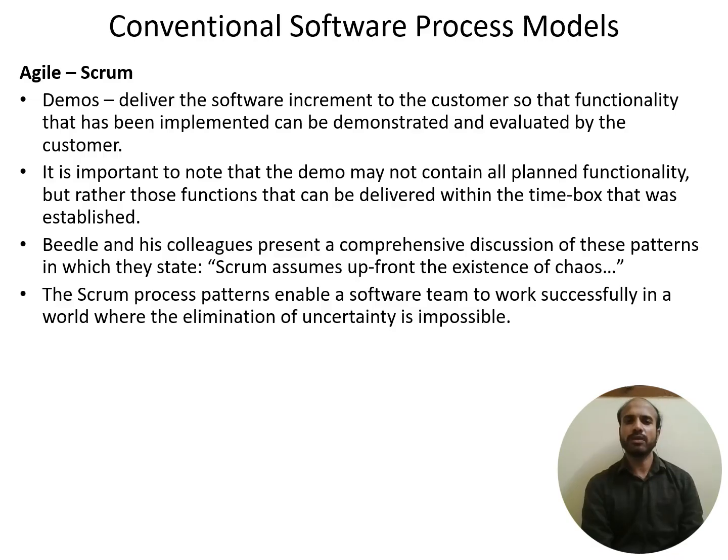If it is not successfully completed, then there will be feedback from the customer on what is missing, and how exactly that can be fixed will be decided in the subsequent sprint and it will be added in the backlog.